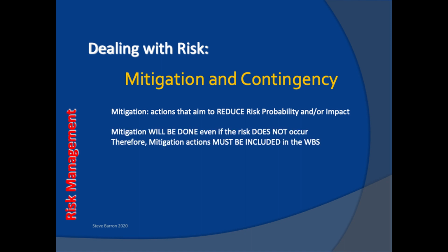In all cases, mitigation actions will be done in advance of a risk occurring. Therefore, mitigation actions require resources and will have a project cost. All mitigation actions will be included in the work breakdown structure and become an integral part of the project.